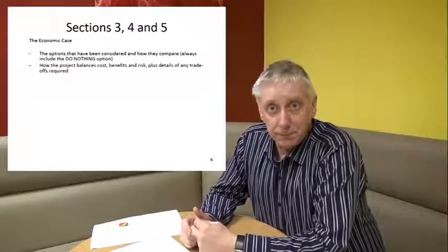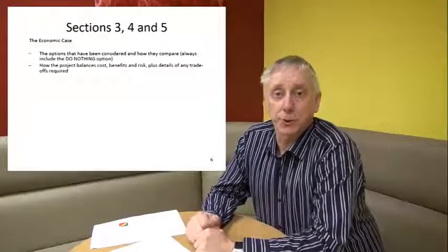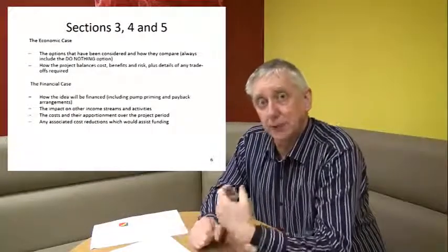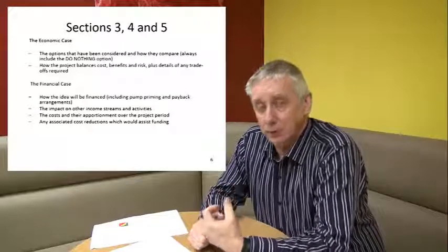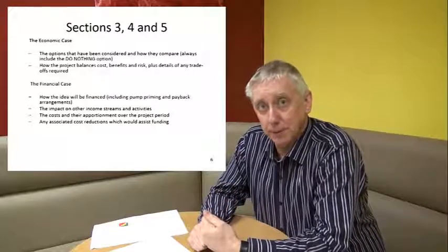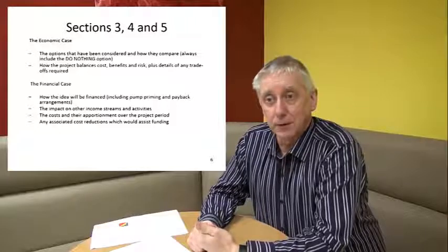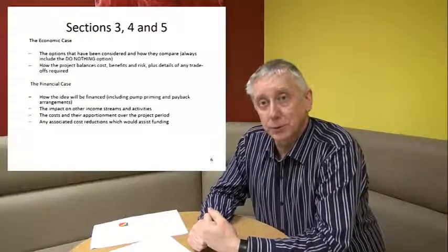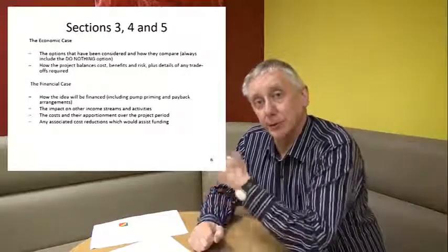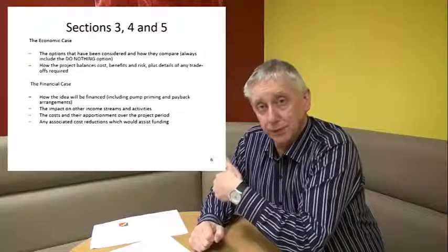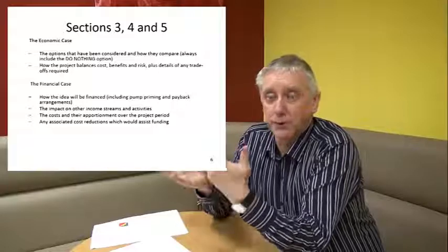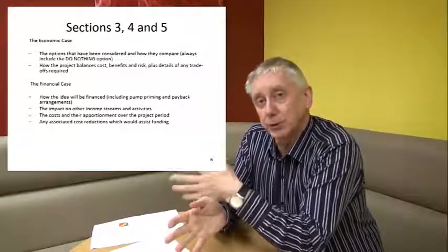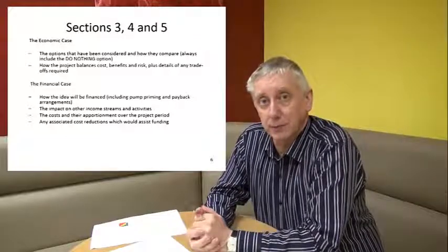The fourth section is what we call the financial case. This is where you start to get into the detail of the numbers. How much will your proposal cost? Is it new money? Is it recycled money? Is it a proposal which requires money now which will deliver savings later, in which case you need what is the public sector equivalent of a bridging loan. You need the money up front, which you will agree to pay back through savings.